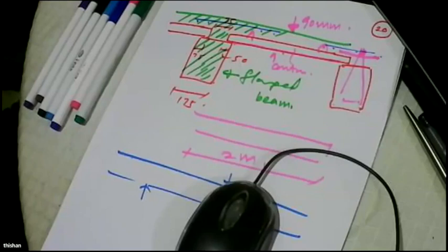They are using it as the hospital. Absolutely no problem in the system. And cost-wise, in 2015, the cost per square foot was 7,000 rupees, and I completed it for 3,500 rupees. So my target is always a minimum 50% cost saving from the conventional systems. So the system that I presented, if you put everything together as a lightweight hybrid multi-story construction, the construction saving can be anything between 50 to 60%.